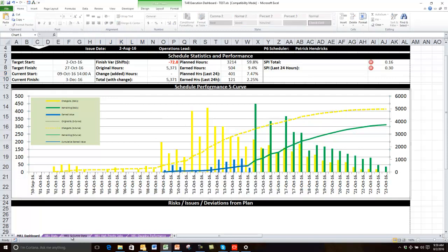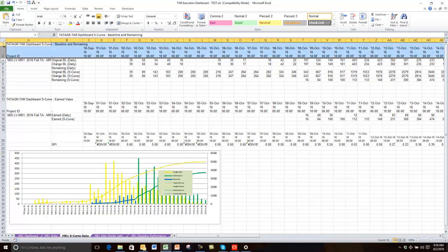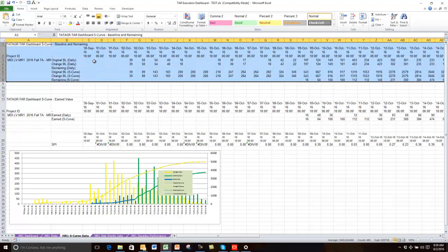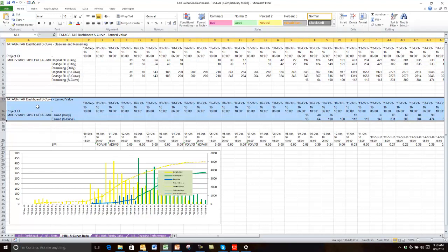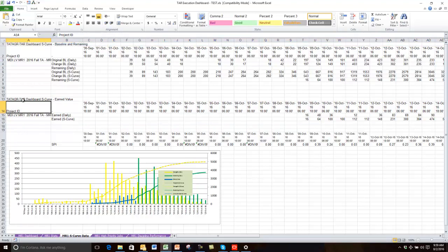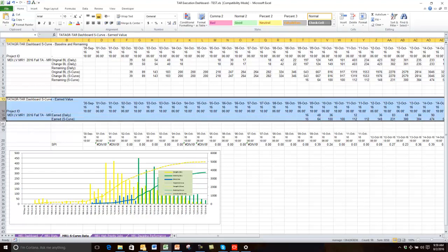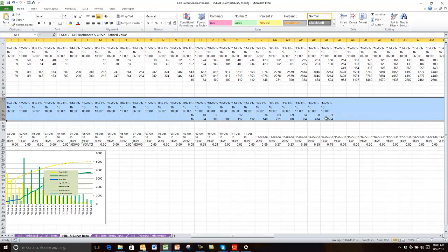The next section is the S-curve data, which all comes from the MR1 S-curve data sheet. I mentioned earlier that I run two P6 reports for this. The first one contains the planned value — both the baselines and the remaining data — and gets pasted in at A1. Then I run my earned value separately and it gets pasted in at A13. The reason I run it separately is because I want to run the time range of the earned value up to the data date — from project start up to the data date — whereas the other data might go from project start all the way through the project finish.